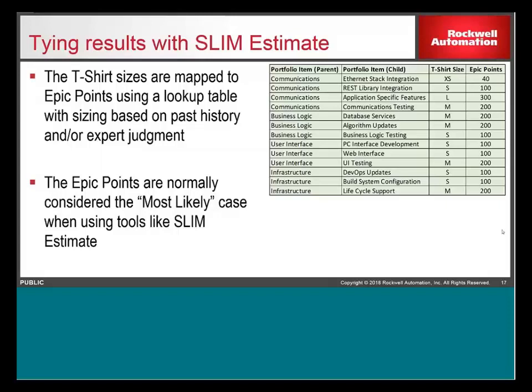I don't know if I can really answer that because part of doing SAFe is to really look at what's coming up in the next PI, and then future work for the subsequent two PIs is usually the best practice. You can certainly do enough estimation for the upcoming PI, but the future PIs may change. My experience has been that we've had some significant directional changes for the future PIs as we've moved forward. We've had some customer feedback where we threw away everything in the next two future PIs, and we have a completely new plan for the future work.